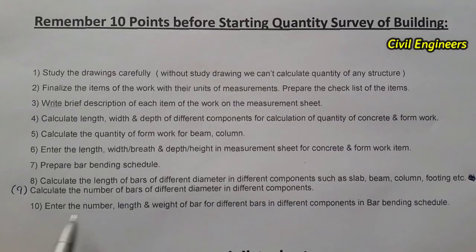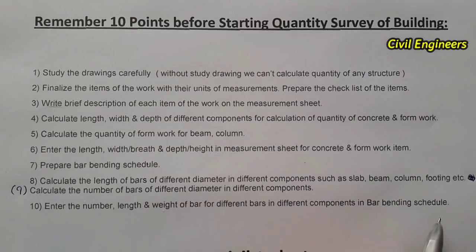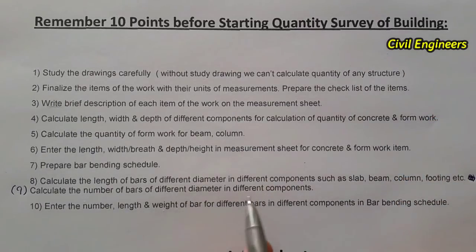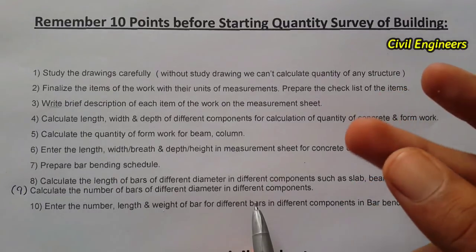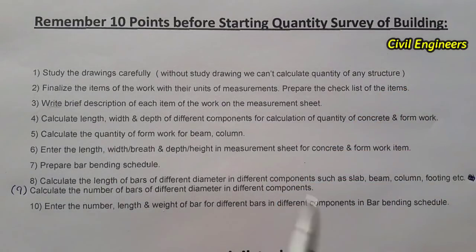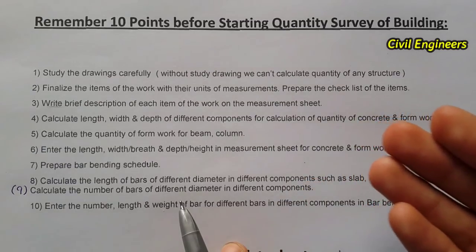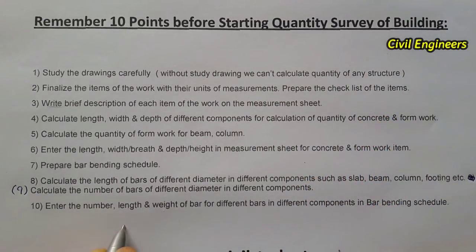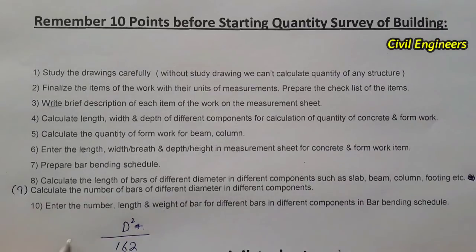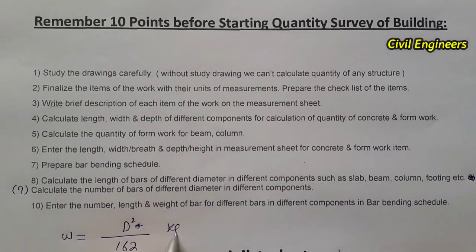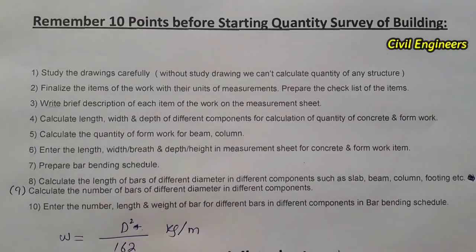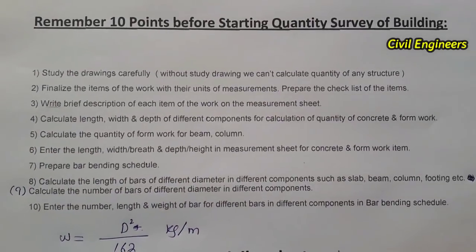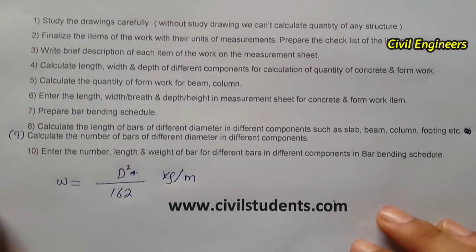The tenth and last point is to enter the number, length, and weight of bars for different bars and different components in the bar bending schedule. In building works we commonly use 8 mm, 10 mm, and 12 mm diameter bars. To find the weight of steel in kg per meter, we use the formula: D² / 162, where D is the diameter in millimeters.